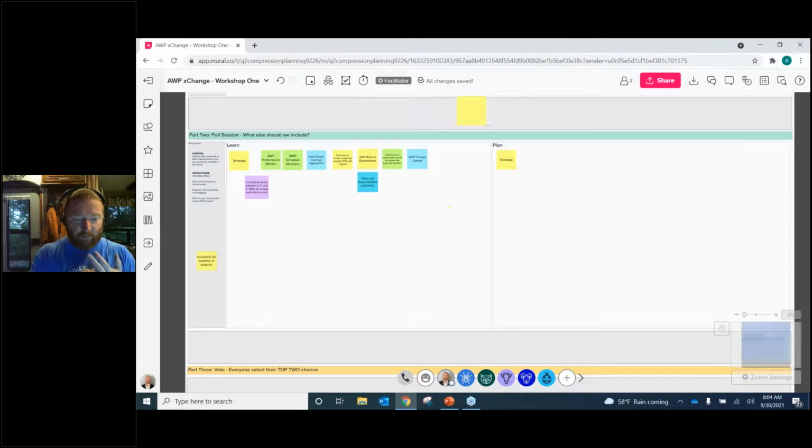The other biggest variable is when, and therefore what type of AWP you're doing. When we built the one for CII, if you come to us and do an ROI during FEL2, then you have the option of doing full AWP, all the things we've been talking about in this presentation so far. If you come to us a week before construction, you can still get savings, but they are less because you've missed out on the opportunity to do a lot of the upfront planning that you could have done during FEL2, FEL3, etc. So we scaled the return on investment based on your maturity and what stage of the project you're at, or what type of AWP you're going to be doing, because everybody always wants to think they're going to do it perfectly first time.